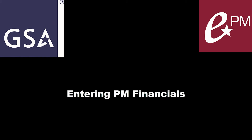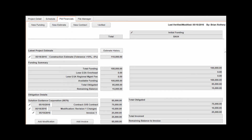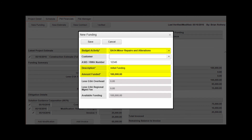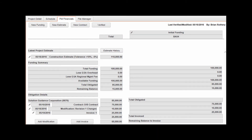Entering PM Financials. With the appropriate project open and the PM Financials tab selected, click New Funding in the toolbar. Populate required fields as highlighted and additional fields as needed, then click Save to continue. Repeat these steps as needed to record all funding sources. Each funding source will be displayed in a separate column on the PM Financials tab.